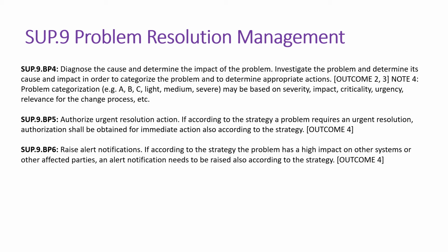Or which category it comes into: this problem is recognized as a part of the requirement, this problem is recognized as a part of the project management, this problem is recognized as a part of quality assurance. So we have to bucketize, and then analyze the density of the problems in a particular bucket. Then we need to find out why there are larger problems in that particular area. That's how we will do the root cause analysis, and we will find out the impact of the problem. And this is one sort.